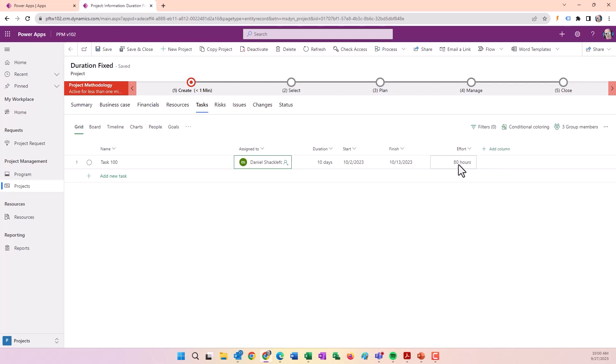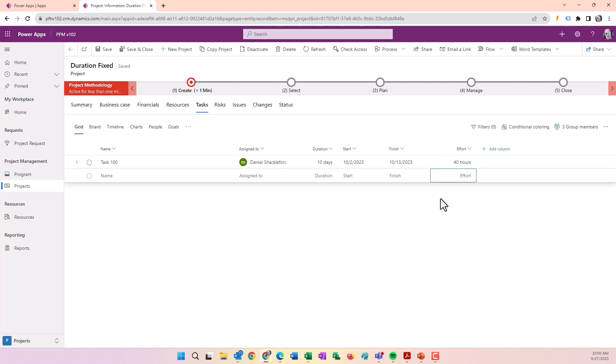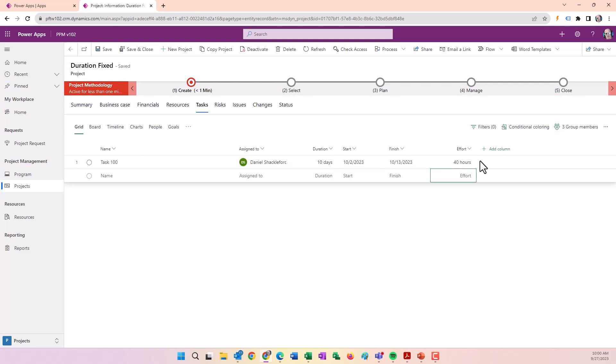It shows 80 hours. If I change the 80 to 40, the duration stays the same because we specified Fixed Duration. What changed is this person is going to do 40 hours over 10 days.